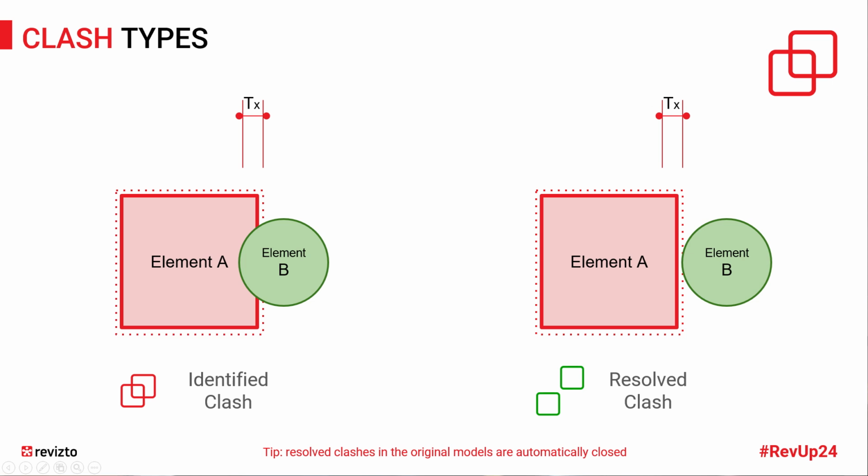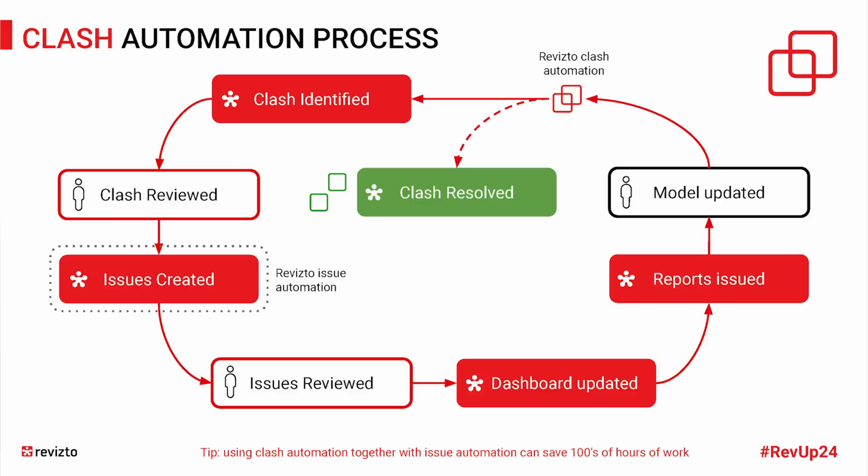So we're not going to be able to walk through every graphic here, but I'm just showing you what a hard clash versus a clearance clash might look like. So imagine that's a pipe and you want to imitate some insulation. You could put a clearance around that without having to model it. And as long as that clearance hits that element A, it would detect a clash. Hard clash, there is no clearance on it. It's just two objects touching each other.